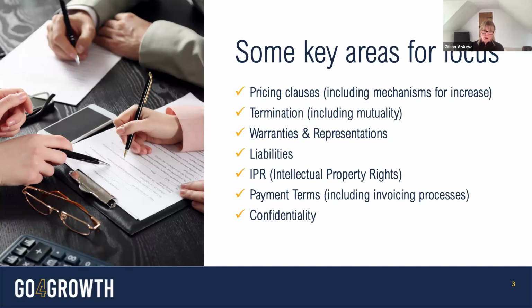Often this clause is a one-way clause, and it's not an unlawful clause as we understand it, but it wouldn't necessarily be mutual. When I say one way, that means the client might be able to invoke that termination for convenience clause, but you wouldn't have a mutual clause. So you wouldn't be able to terminate for convenience. As a provider, you might only be able to terminate for cause. For example, non-payment of goods and services.